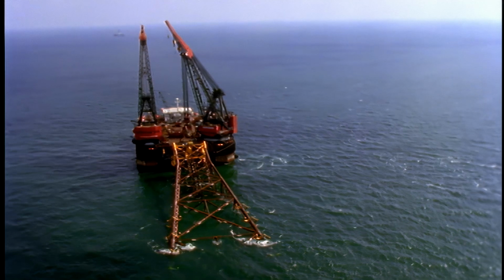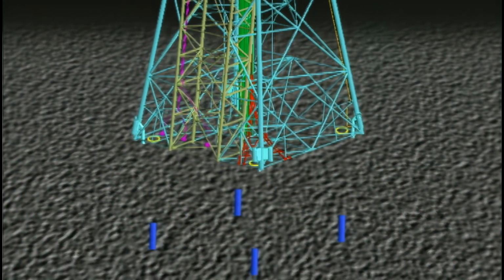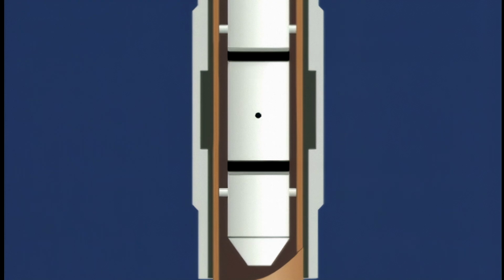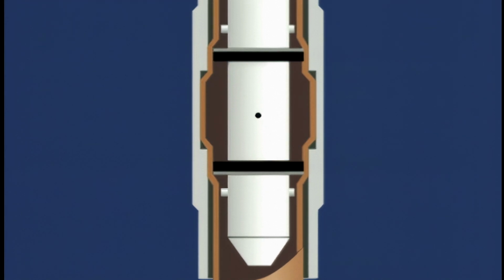With the derrick barge's assistance, the jacket is placed on the pre-installed leveling piles using docking porches fabricated to match previously surveyed positions. The leveling piles were installed in April 1997 by the Balder. Like the Salsa jacket that immediately preceded it, Spirit is secured with piles swaged to the jacket pile sleeves by an 84-inch diameter Hydrolock tool. Spirit and Salsa pile sleeves were fabricated from many short, heavy wall cans, but for future projects, Shell is considering machining pile sleeves in a single piece.